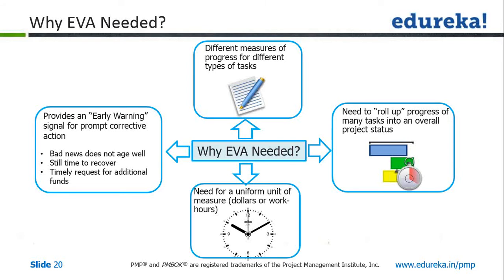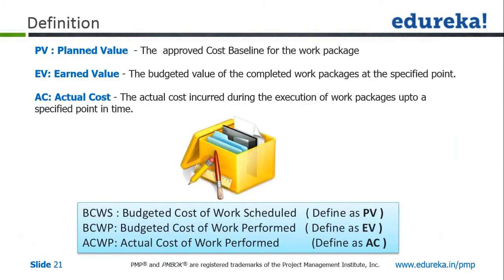Let us quickly talk about how it is done. We first need to understand these three key elements of earned value analysis. PV — that is planned value — means the work that was planned till that checkpoint. Earned value is how much work we have completed till that checkpoint. And actual cost, that is AC, means how much money we have spent in actual in doing that particular work.